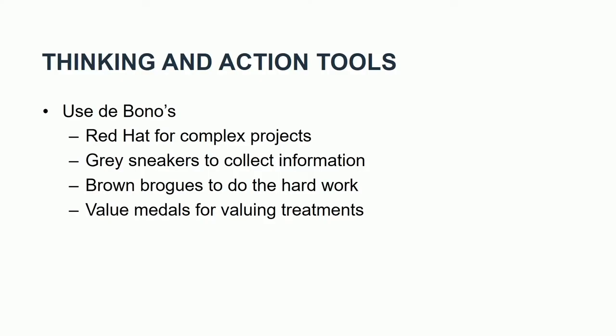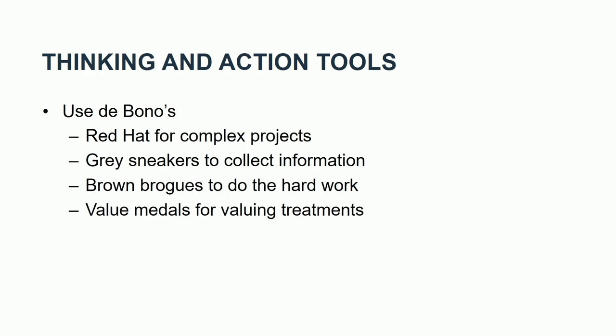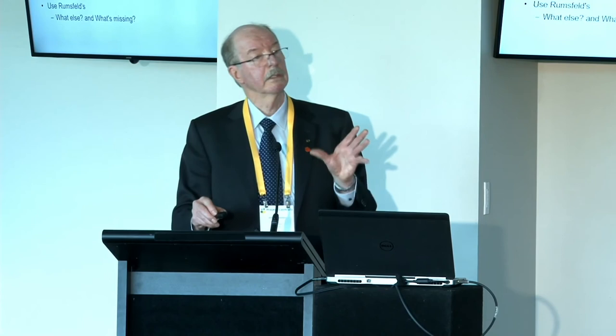For De Bono's thinking tools: the red hat is for emotions — you're allowed to say, 'I think the project manager's a poor leader.' It creates laughs and can generate good ideas. The grey sneakers mean sniff around and get the information. The brown brogues mean roll up your sleeves and do the hard work. The value medals are a very good way for assessing treatment solutions — you can assess in a plus-three to minus-three rating for things like profit, people, and environment. Rumsfeld is famous for asking 'what else?' and 'what's missing?' — he says only 4% of people can tell you what's missing, which separates good risk thinkers.